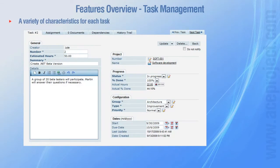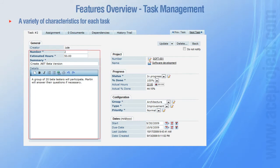Managing many tasks can become laborious if project managers are not equipped with the right tools. This is why in ACE Project, a task can be identified with a task number, the number of estimated hours to completion, a summary, and details.